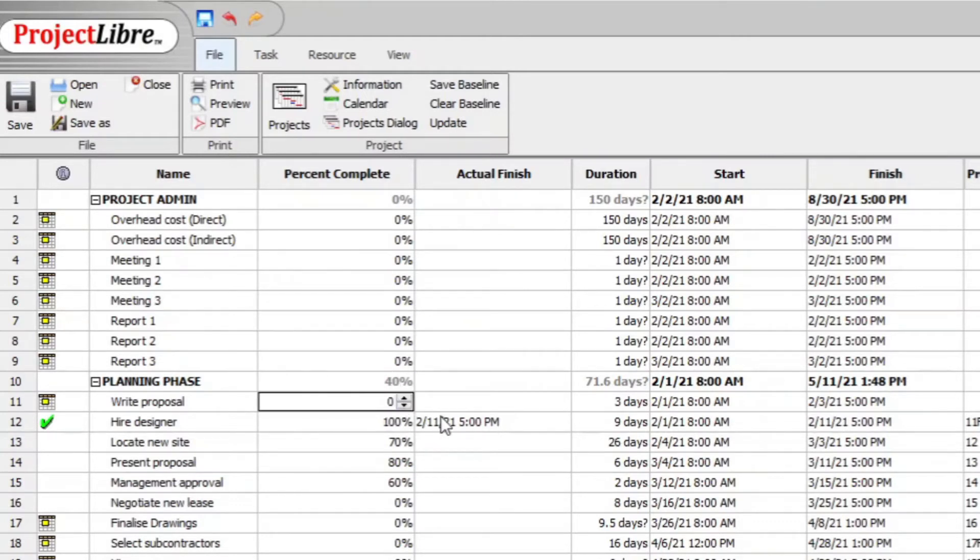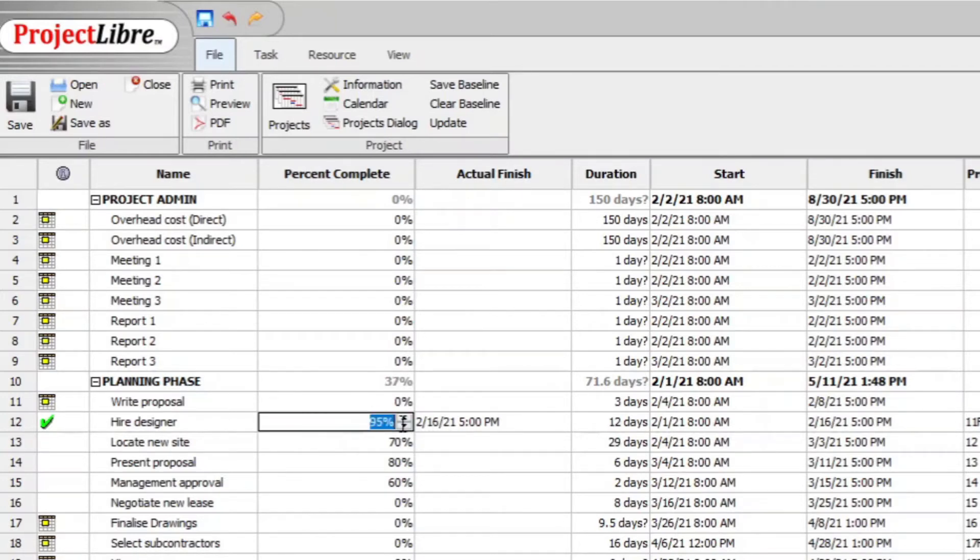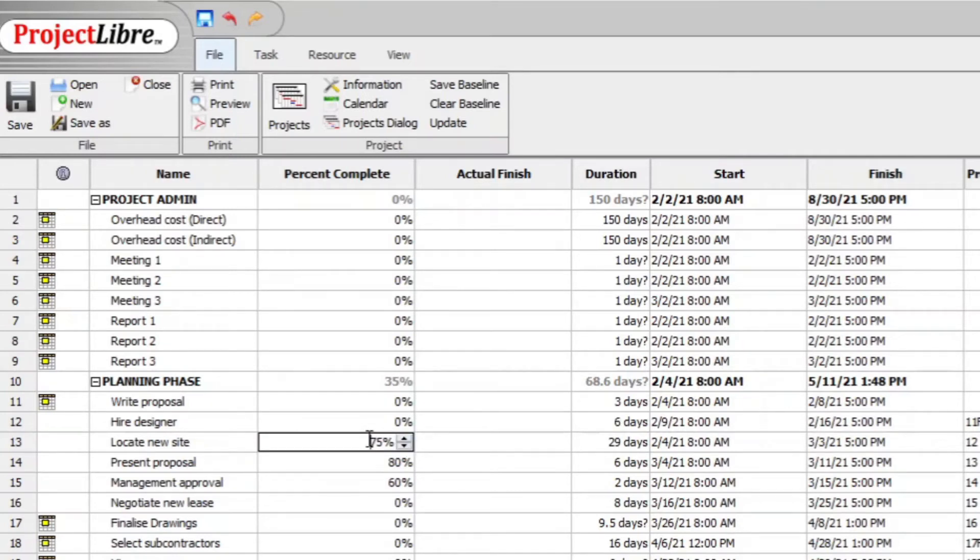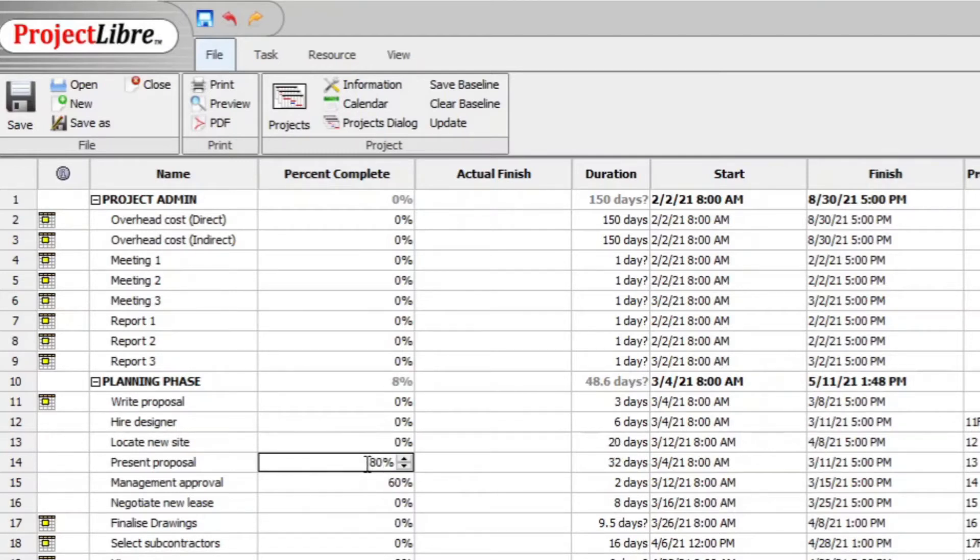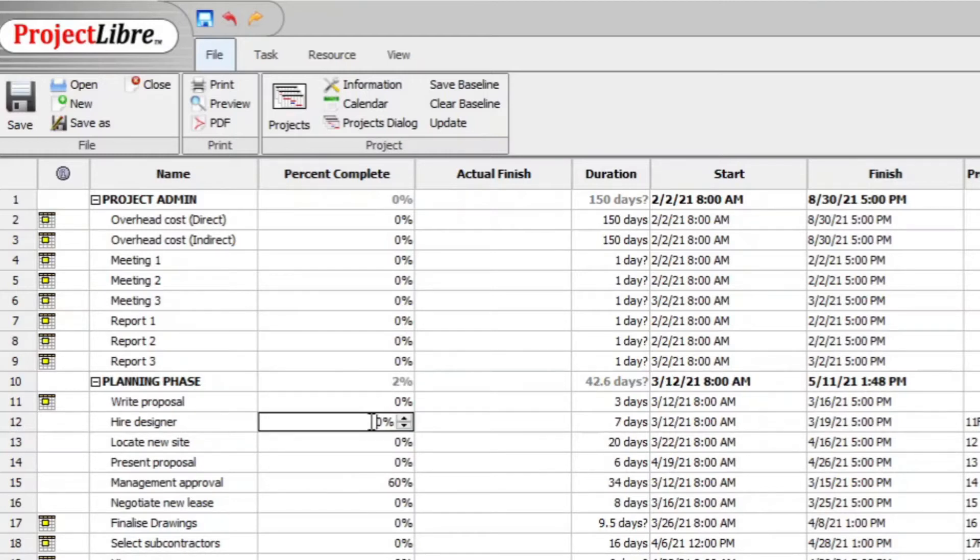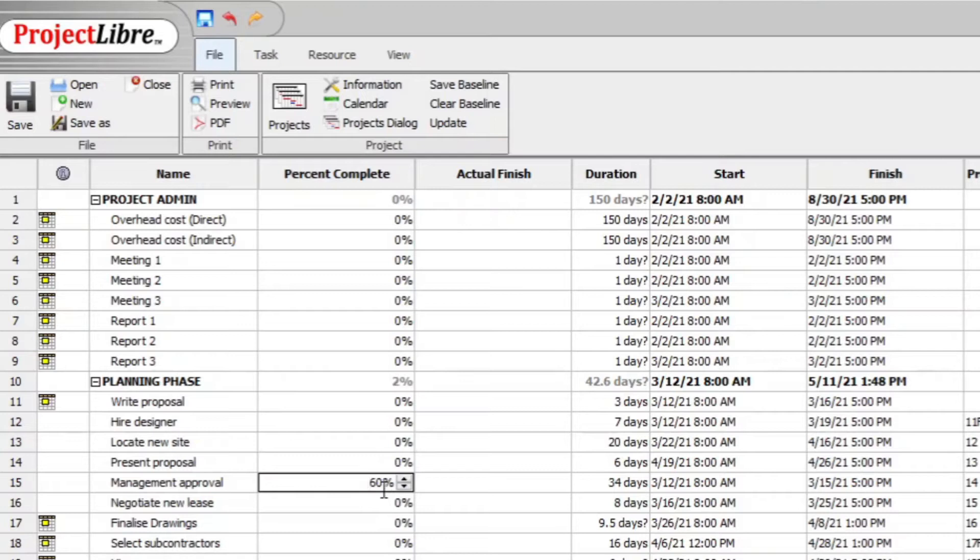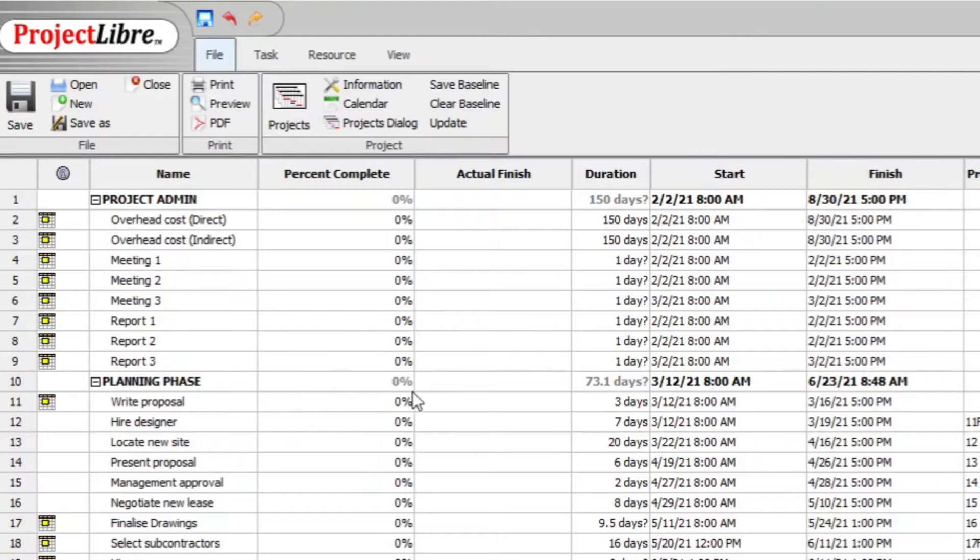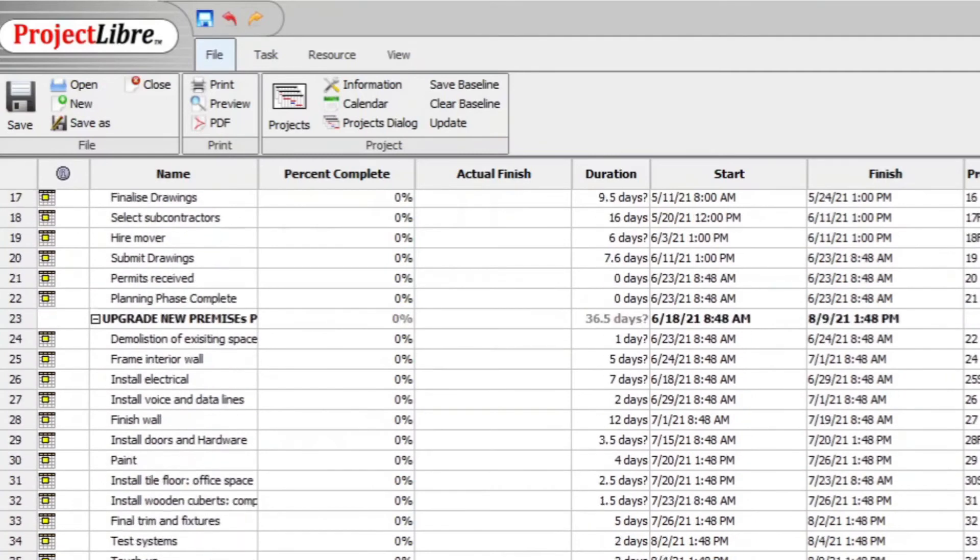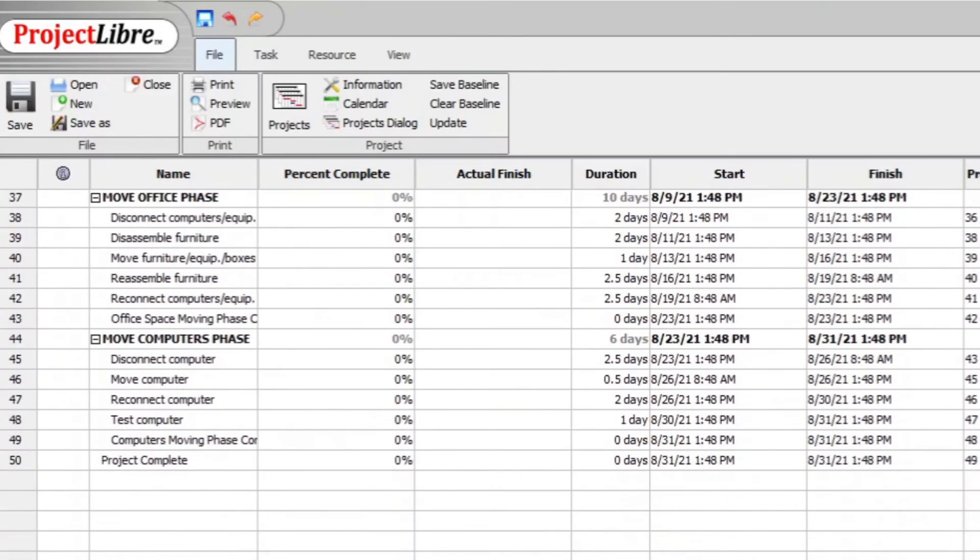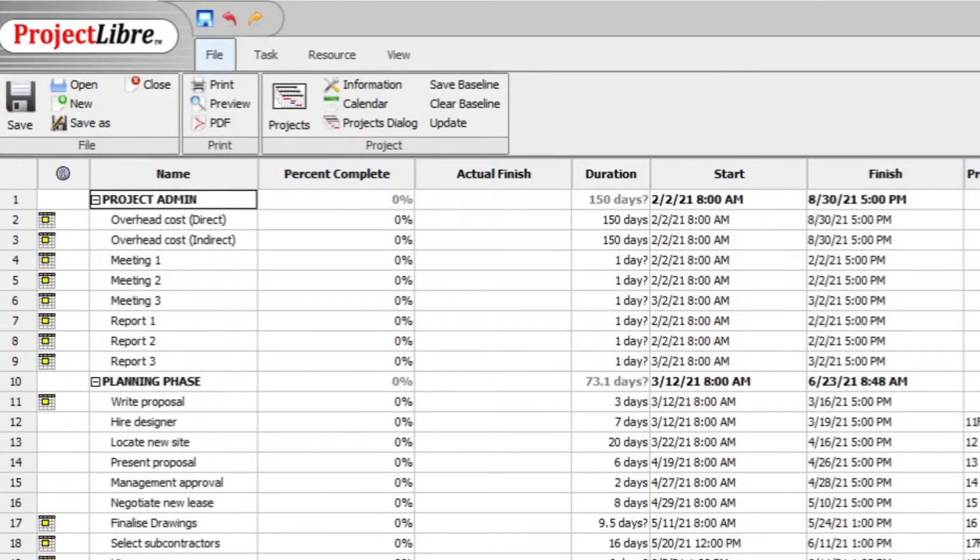And so you continue. If you only have the work that is completed fully, your baseline will still be incorrect because the baseline costs work also on the percentage of the work that is completed. So, set everything to zero. And it is easy then to see if all the tasks are zero. If you click on the subtasks, there it is zero. There it is still something outstanding. So, it is two percent of the work. Click it. And now you can see this summary task is zero.